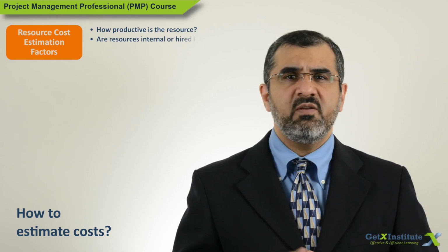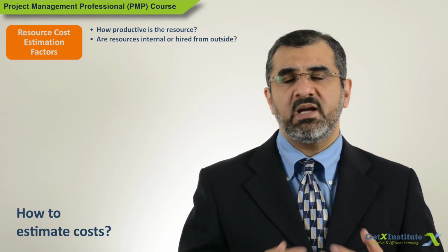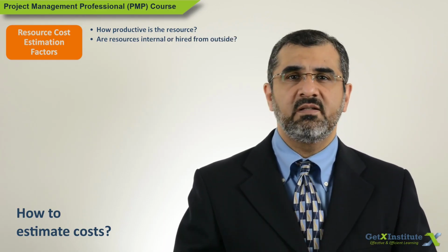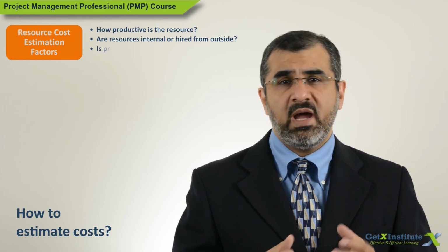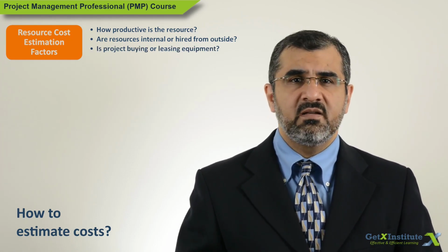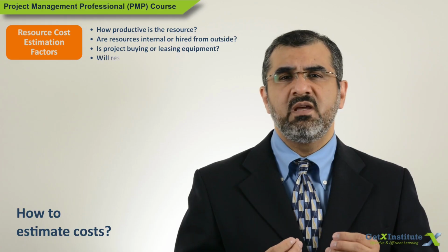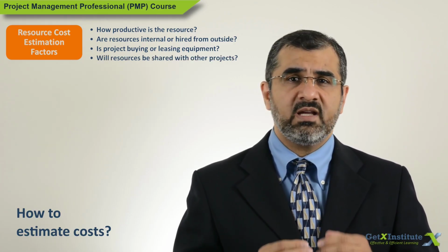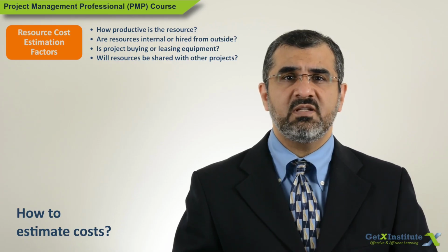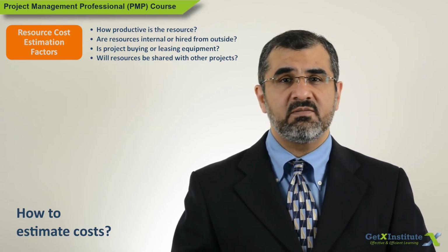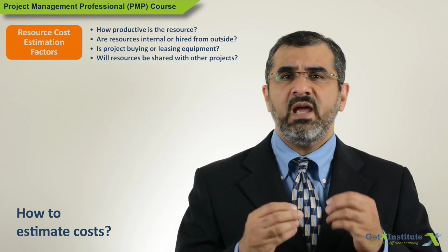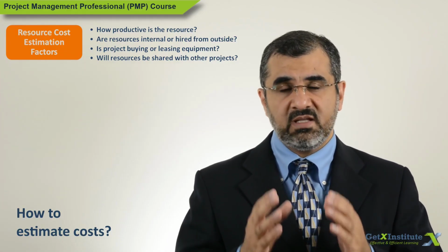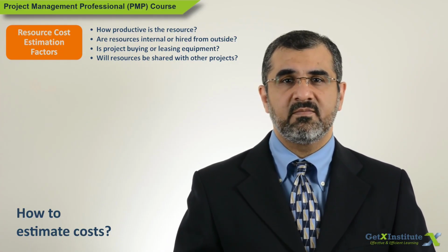Other things to be considered are whether work will be done internally or by someone hired from outside. Is the project buying equipment or leasing it? Will some resources be shared with other projects and operations, or will the project have exclusive access to those resources and have to take the full cost? All of these and many other questions can impact the cost estimates.